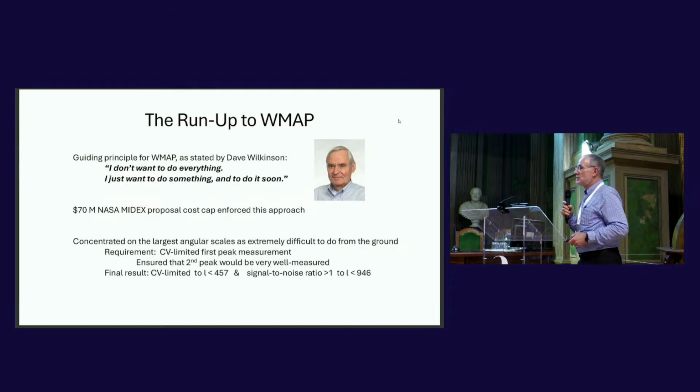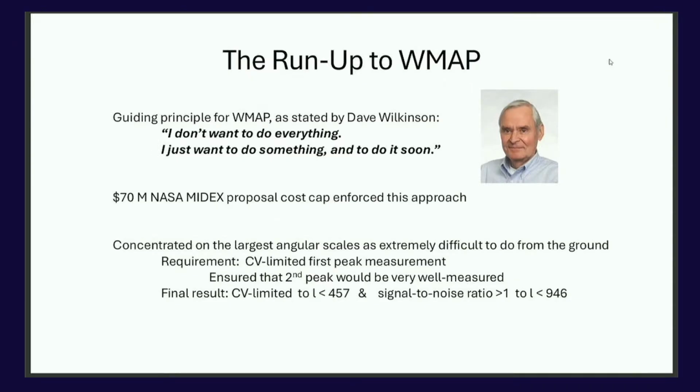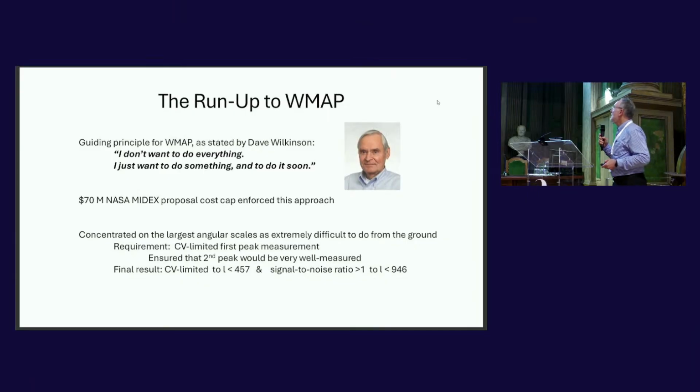The guiding principle for WMAP that I think we all shared on the team, I remember Dave Wilkinson saying once, I don't want to do everything, I just want to do something and to do it soon. And that was reinforced by the cost cap of the MIDEX proposals. It had to be technology ready, had to be a $70 million cost cap, and that worked fine for us.